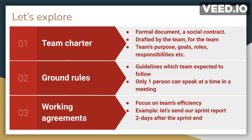Ground rules can also be formed for communication channels. For example, in some organizations they may use both Slack and Google Chat as communication tools. However, a team may decide to use only Slack for all communication, because otherwise the team may have to monitor both tools, which may not be productive. So the team can set a ground rule saying, 'We will just use Slack for all project communication.'